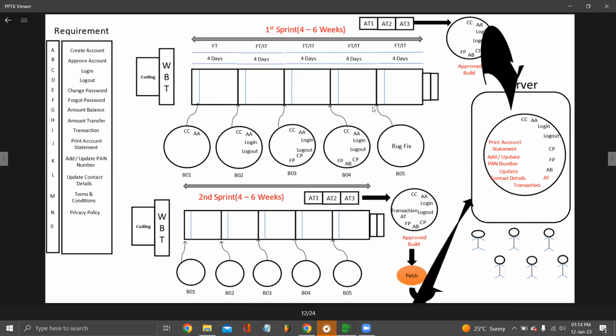So I'll tell you what the difference is. One release can be equal to one sprint, and there might be chances that multiple sprints can be equal to one release. What does this mean? It may happen that when you complete your one sprint's work, you are not moving that work to the production. Maybe the output of that particular sprint is very small. You can't move it to the production right now. You will combine both sprint outputs and then move them to the production.